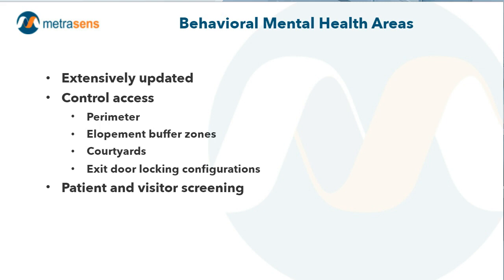And looking very closely at exit door configurations. Some clients have experienced real resistance with delayed egress around the country, and some of it's because some of our local fire departments aren't really on board with the latest NFPA 2012 that's been approved by the Joint Commission and CMS for those of us in the States. Sometimes the local jurisdictions won't let you do what CMS and the Joint Commission will allow, and sometimes it takes pointing that out, or an incident. Sometimes they will allow things more easily if you ask them to put in writing why they won't allow you to do certain things.